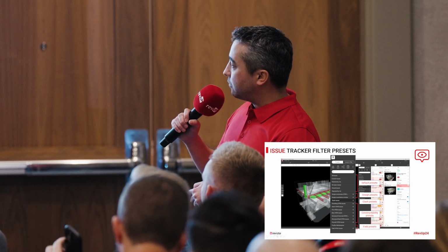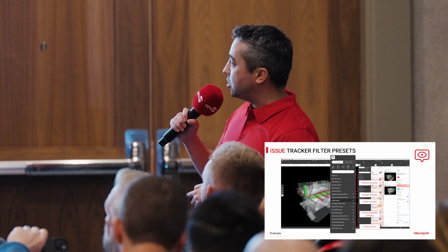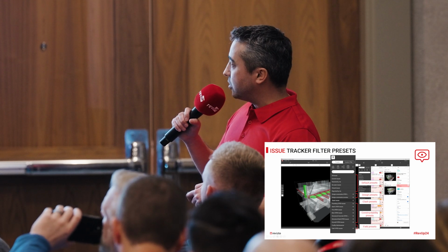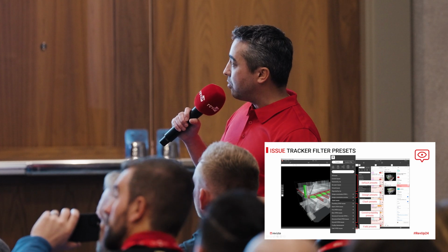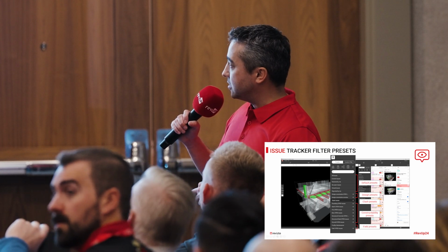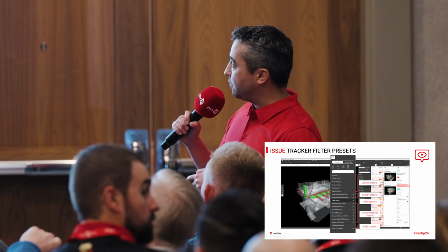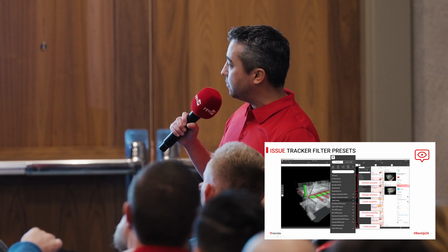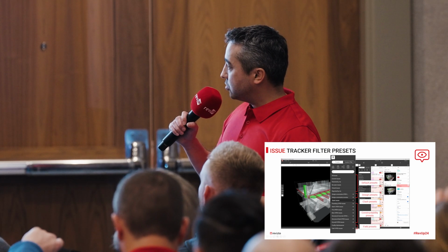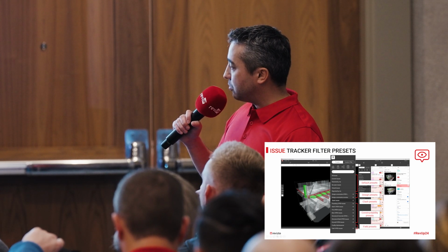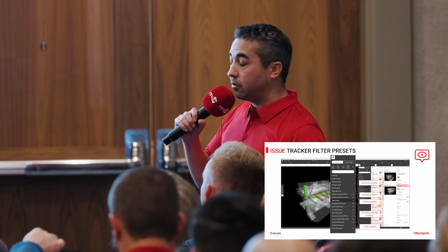What I like to do is I like to figure out what design issues are related to constraining my project that'll hold up coordination. So I'll make very specific filter presets so the design team knows what they need to work on. Or I might bring this either up in a report and bring it up in the OAC meetings as an example. Clash, you can see very simple, just looking at all the clash issues, and if you want to figure out who it's assigned to, just go into custom filter and click on assignee or company. I do like to look at things as a constructability issue during my coordination meetings. You can see it's broken out by scope of work or trade, and then I might want to create some presets specifically for the field.